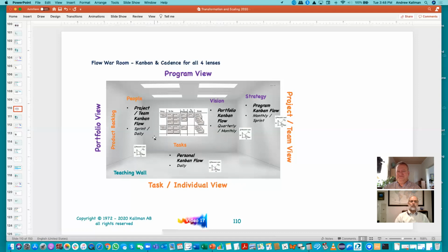And so on the Kanban board, the individuals knew what tasks they had selected for that sprint. And then over time, that board changed as we got into the different phases. The team said it's easier to have swim lanes so that they knew their work. And so that Kanban board was very dynamic as far as the layout, but the concept of execution was the same throughout. We had our sprint goals posted above the board so that the team, as they did their planning, knew what the goals were for each sprint. And then, as we talked about, pulled from the backlog wall.